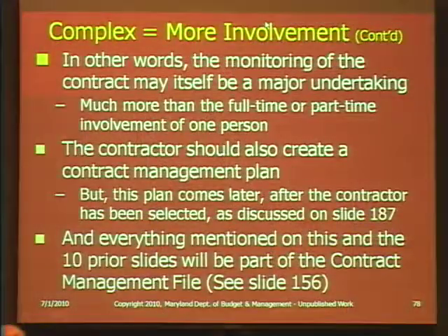And one of the things that we will emphasize is, aside from the state creating a contract management plan, we should have vendors create a contract management plan so we can see how they intend to manage their own contract, what resources they will put in place, what time frames, so that we can monitor not only our plan, but in particular their plan, and see that they're following their plan. So that's a requirement in our specifications that will help us monitoring later by requiring a vendor to do its own contract management plan.